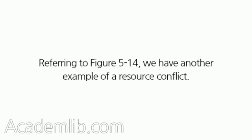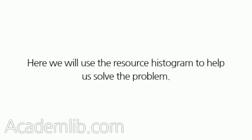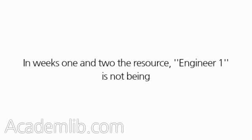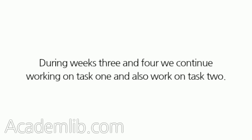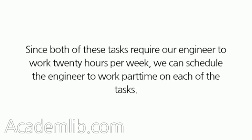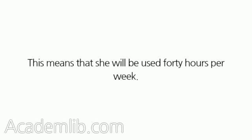Referring to Figure 5-14, we have another example of a resource conflict. Here we will use the resource histogram to help us solve the problem. In Weeks 1 and 2 the resource Engineer 1 is not being fully utilized — Engineer 1 is used for only 20 hours per week. Task 1 is the only task using our engineer. During Weeks 3 and 4 we continue working on Task 1 and also work on Task 2. Since both of these tasks require our engineer to work 20 hours per week, we can schedule the engineer to work part-time on each of the tasks, meaning she will be used 40 hours per week.